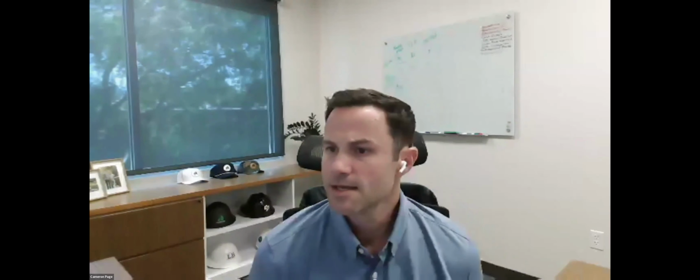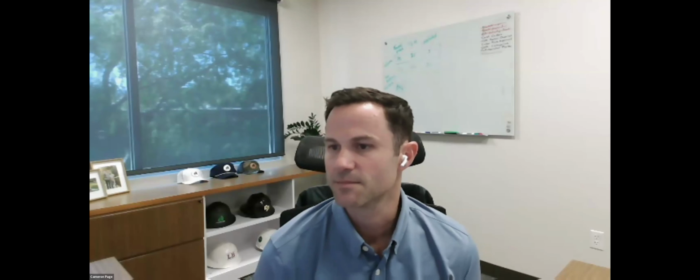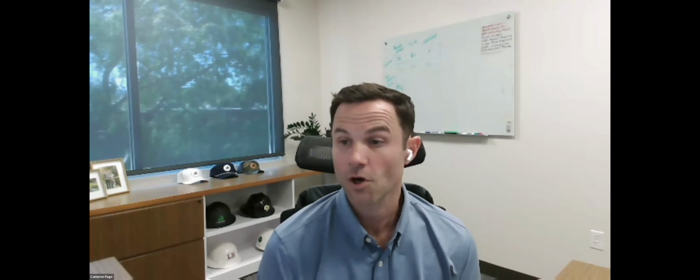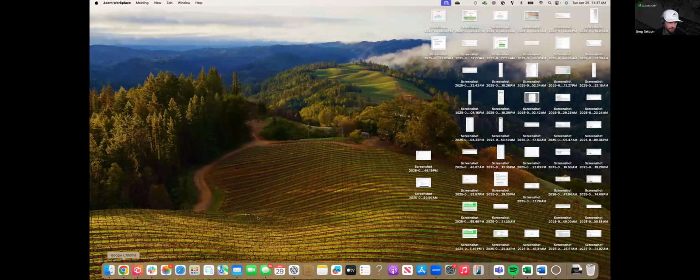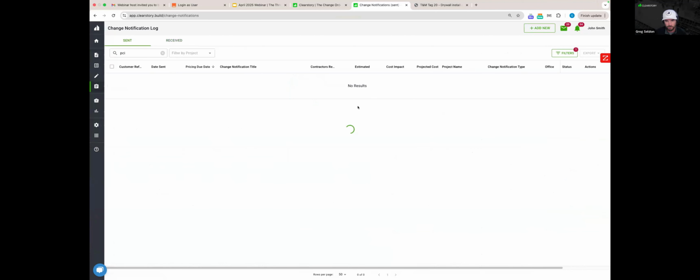And then another question that came in, and maybe Greg, you can take this one. Can Clearstory handle a workflow with multiple price submissions? Currently on a project where we need to submit a ROM to the owner shortly after we get a design change. Thanks. So there are a couple of workflows. Greg, anything that you would think through for that? Yeah, a lot of our GCs will get a ROM from the subcontractor within 5 days, and then they owe them a final price within 2 weeks or something. So, one, there is a column if you're not getting a sub ROM and you want to internally indicate a ROM within the change notification log, there is a field for that.